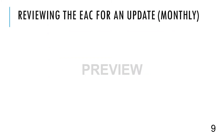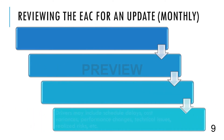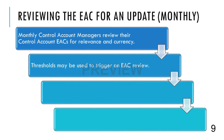On a monthly basis, one of the roles of the Control Account Manager, or CAM, is to review the EACs of their control accounts for relevance and currency. The contractor may establish thresholds for an EAC review at the control account level. While exceeding this threshold may be a good indicator that an EAC should be evaluated, it does not necessarily mean that an EAC must be changed. Similarly, not exceeding a threshold does not mean that the EAC should not be reviewed for realism.